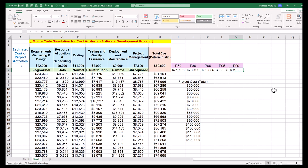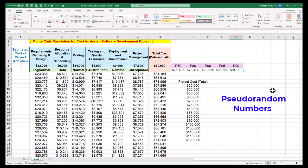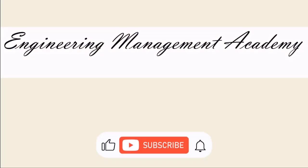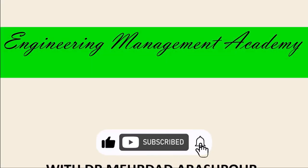The beauty of this risk analysis technique in Excel is the simplicity in creating preliminary results and inferences. However, Excel generates pseudo-random numbers rather than true random numbers — values are produced by a deterministic algorithm starting with a seed, so they are predictable based on that seed and algorithm. For advanced project risk assessment, best practice is to use specialized software such as Oracle Primavera Risk Analysis, Palisade @Risk, or Crystal Ball. This completes the four simple steps for Monte Carlo simulation in Microsoft Excel. You can access the Excel workbook via the provided link in the description below.